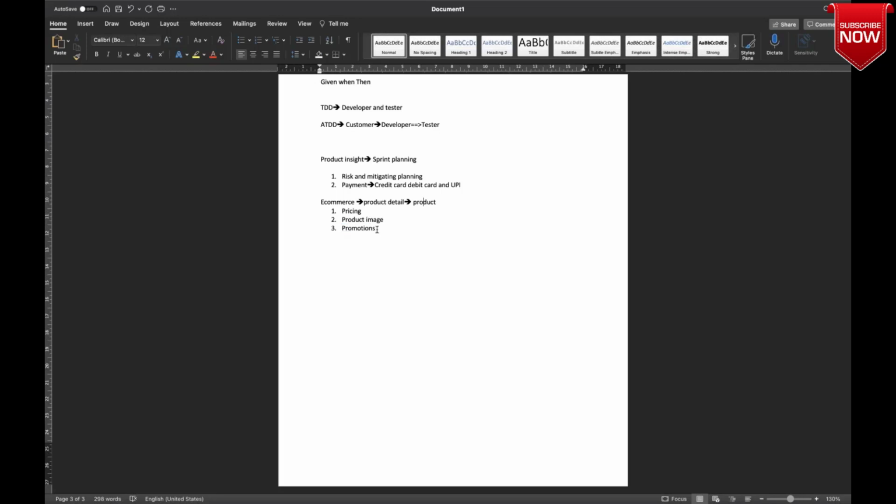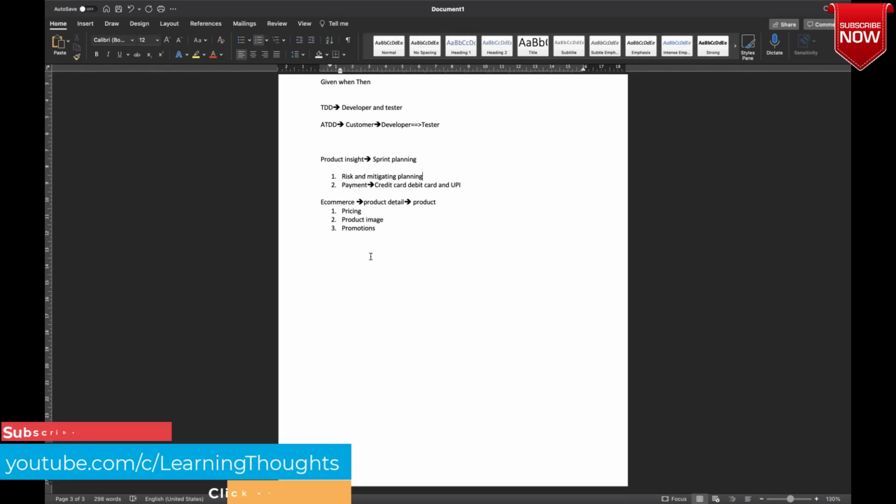Considering these 3 services as a risk factor, while doing the sprint planning meeting, we will consider the integration stories as a mitigating plan of action. When a story falls into this risk bucket, it is dealt with at the end of our development.